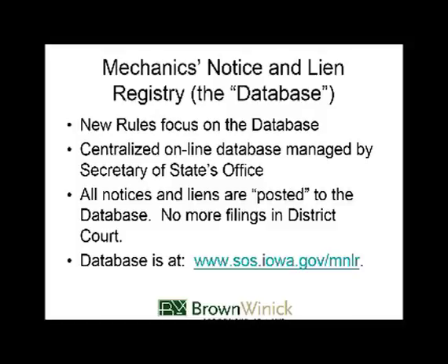The district courts do not need to deal with these cases anymore. Instead, all notices and liens are posted to the database. And you can find that database at the website I've given you, www.sos.iowa.gov/MNLR. The MNLR is Mechanics Notice and Lien Registry.